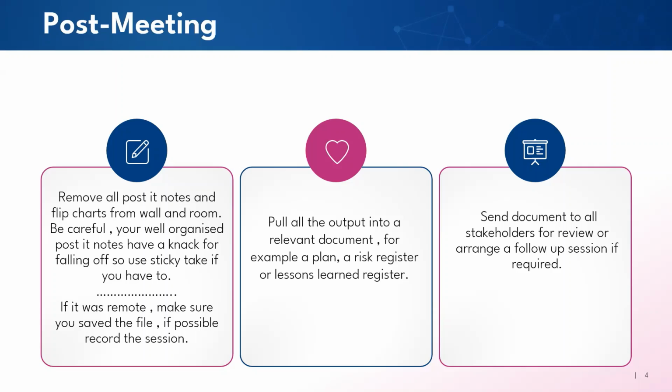Some people might add new things while you're in the meeting, but also you want to make sure that the prioritization is also done. It might be that you set up another meeting not to do prioritization for risk if you've done it already. It might be you now want to say, now you've done the risk, we are sure what the risks are, we know what the priorities are. Can we now focus on the mitigating actions for each of the risks? You can do that in a different workshop, or you can have one-to-one conversations. I suggest in a workshop so that you get it done once and for all.